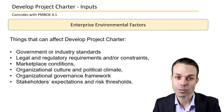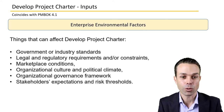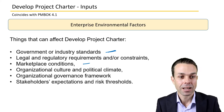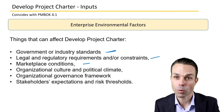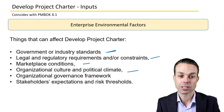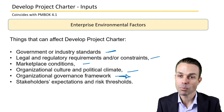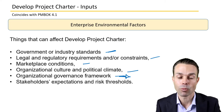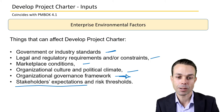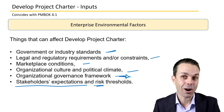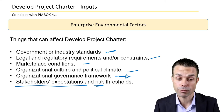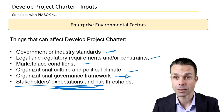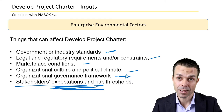We've got EEFs, or enterprise environmental factors. There might be government or industry standards needed as input to the project charter, marketplace conditions, legal requirements, organizational culture or political climate, and organizational governance frameworks. What are the existing templates, or the ways of doing business, that we need to be careful of when creating the project charter? And stakeholders' expectations and risk thresholds — do they have a high or low threshold for risk?